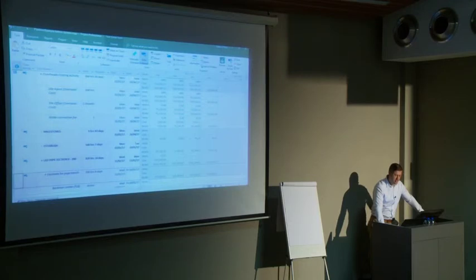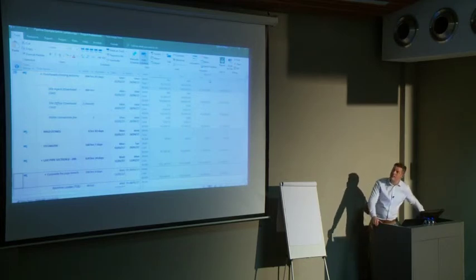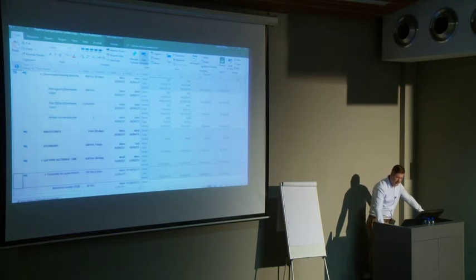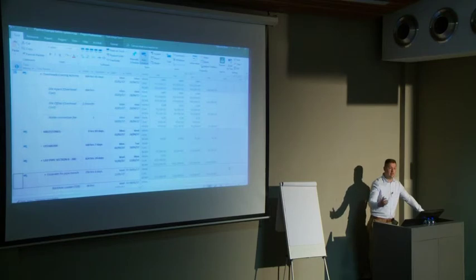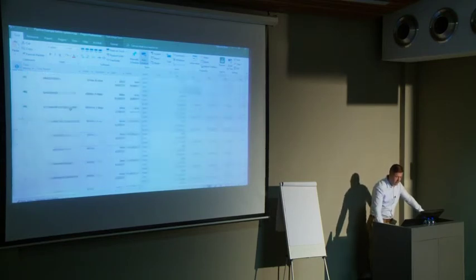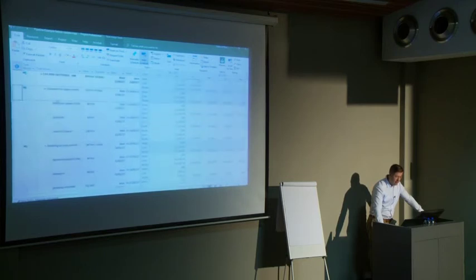And just make sure, typically it'll give you a very wide calendar. You can see there now it's daily or weekly or 2 daily. So I always pull it back to monthly so that I've got monthly figures. It's just easier to work with. There you can see each and every activity, the laying of the pipe, remember excavation, I said there's the TLB, the operator, and the general laborers. That's the hours that they are going to work and when. So the TLB will work 64 hours in January.